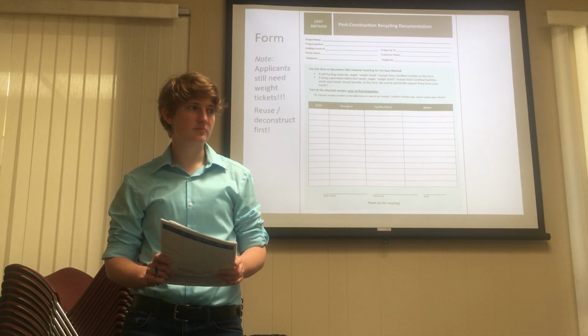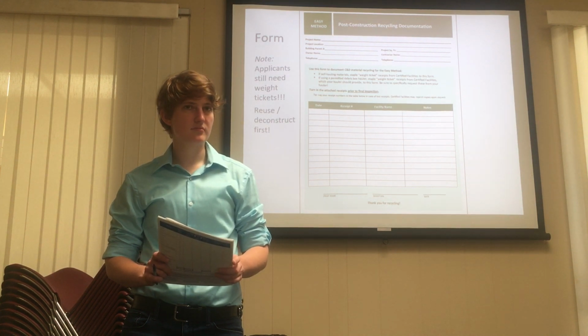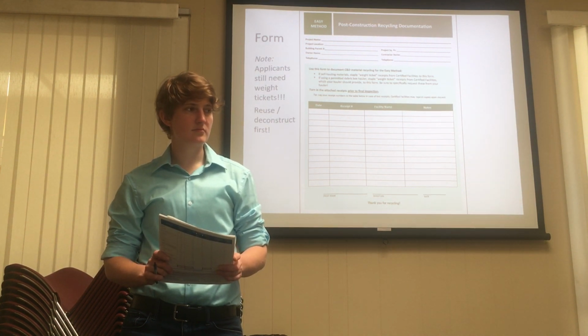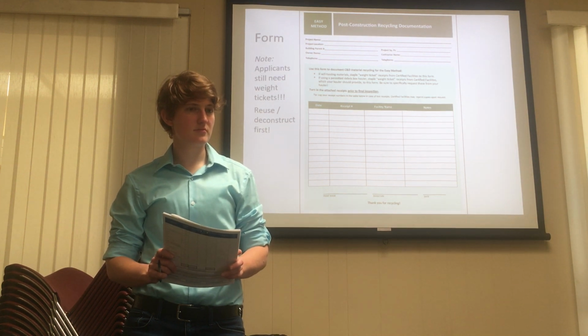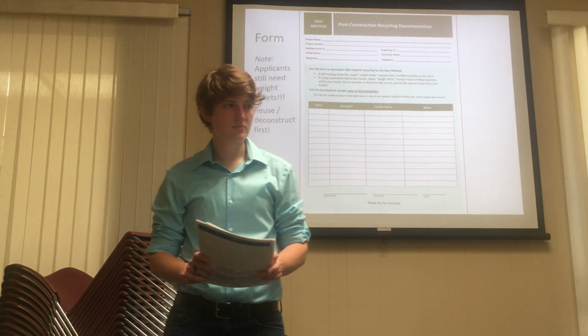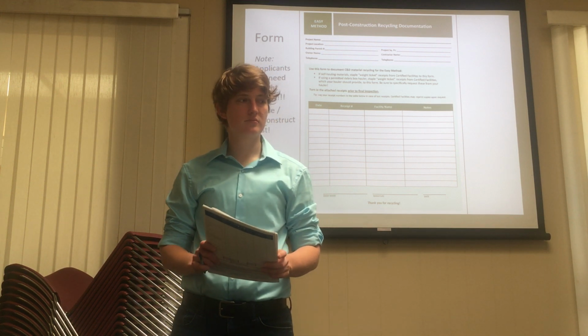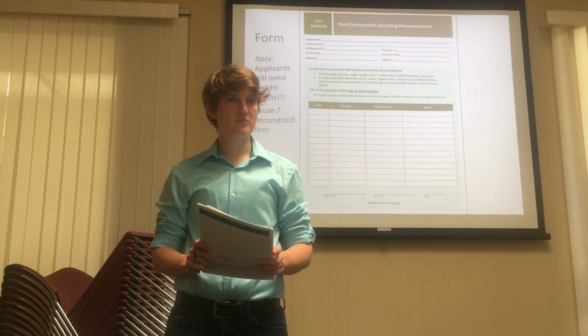We have a box, we put waste management in our inspection item line under finals, so unless that is checked off and approved by a building inspector or counter person, they don't get a final. So it's going to get done, one way or another.